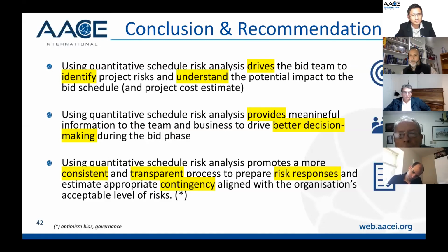But if you have a linear schedule, something like a pipeline, or an overhead line, something that is one activity after the other one, the critical chain method is probably not a bad idea to have a look at. But again, I just prefer the critical path if you're running an SRA.